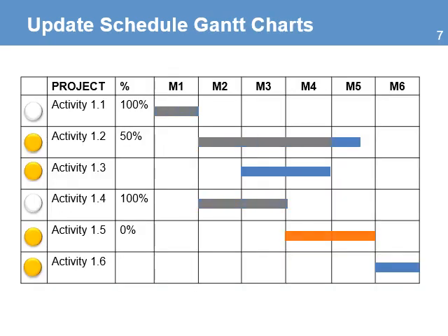Part of updating the schedule includes the updates on the progress made by the project. On the Gantt chart, you will have to update information on the percentage that has been completed. For new activities or activities that have been modified, you will need to update this information. For example, an activity has changed its original start and end dates, and another activity has been deleted from the scope. You need to remove it from the chart.